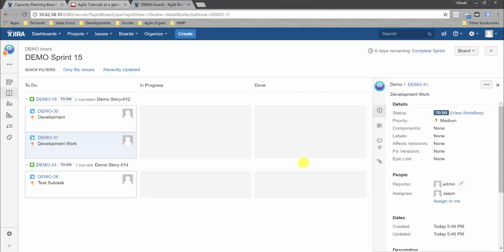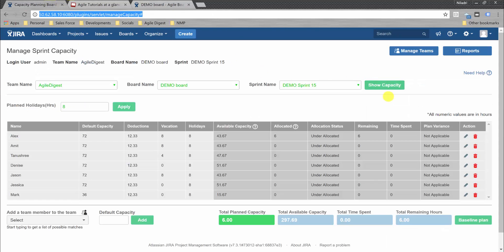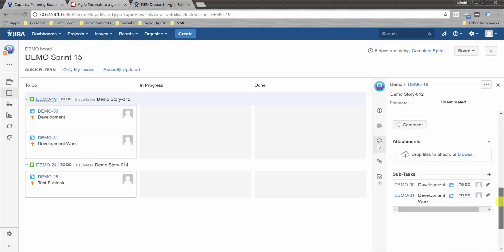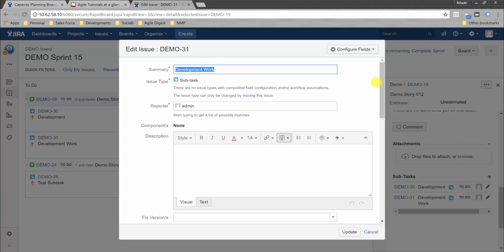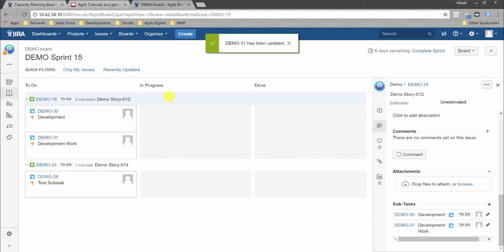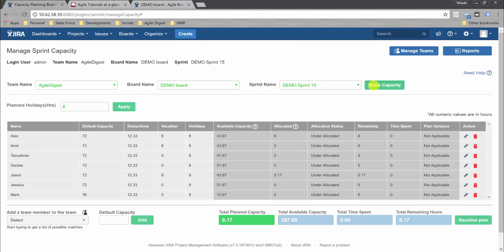After creating the task, we check the capacity view and see Jason has only 0.17 hours allocated — because the estimation was entered without specifying 'h' for hours, so it was calculated as minutes. We update the original estimate to include 'h' for hours, so it becomes 10 hours instead of minutes.